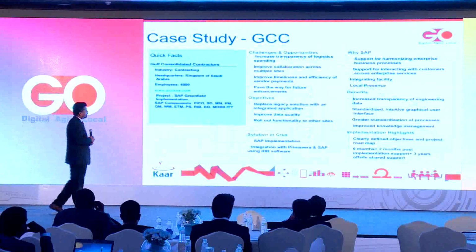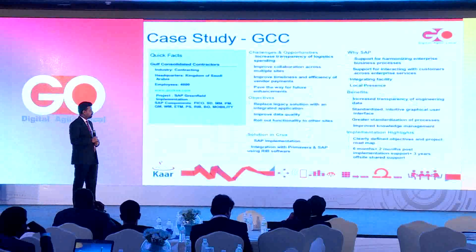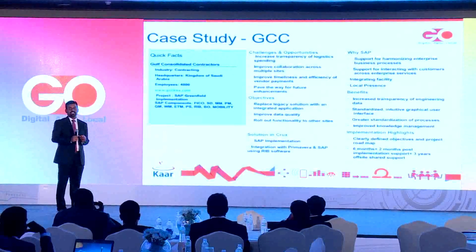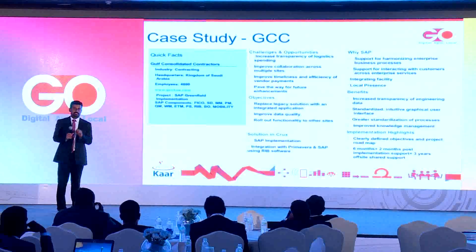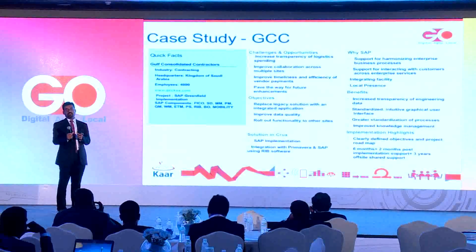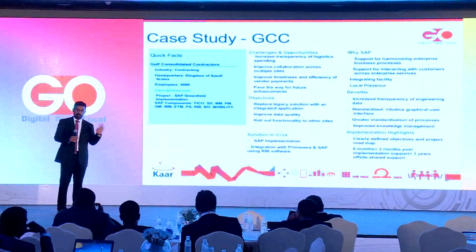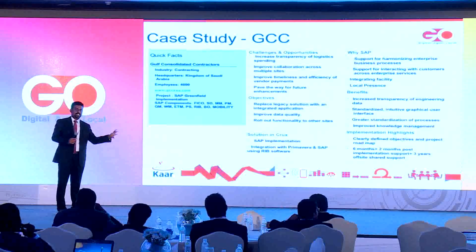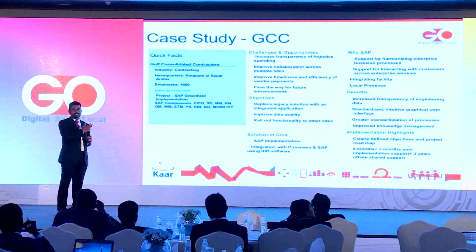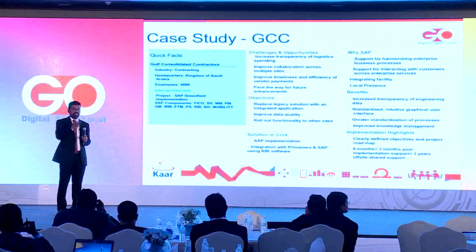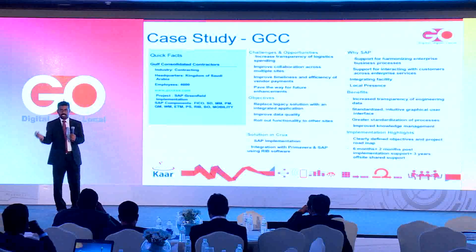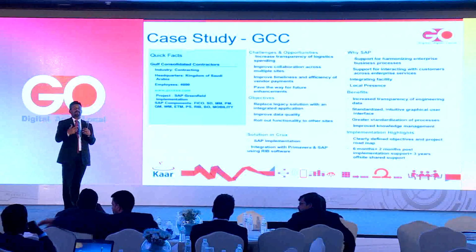So this is the case study where we have done an implementation at GCC, that is Gulf Consolidated Contractors, where we have utilized RIB, but we have not utilized RIB to its potential. We have done an interface between SAP and Primavera. I hope a few of you know that Primavera is basically a planning tool where they used to plan and then monitor the project. So the planning is done in Primavera, and the schedule from it was carried to SAP. RIB served as the middleware to get this information and push it to SAP, and RIB was also utilized to prepare the estimation.